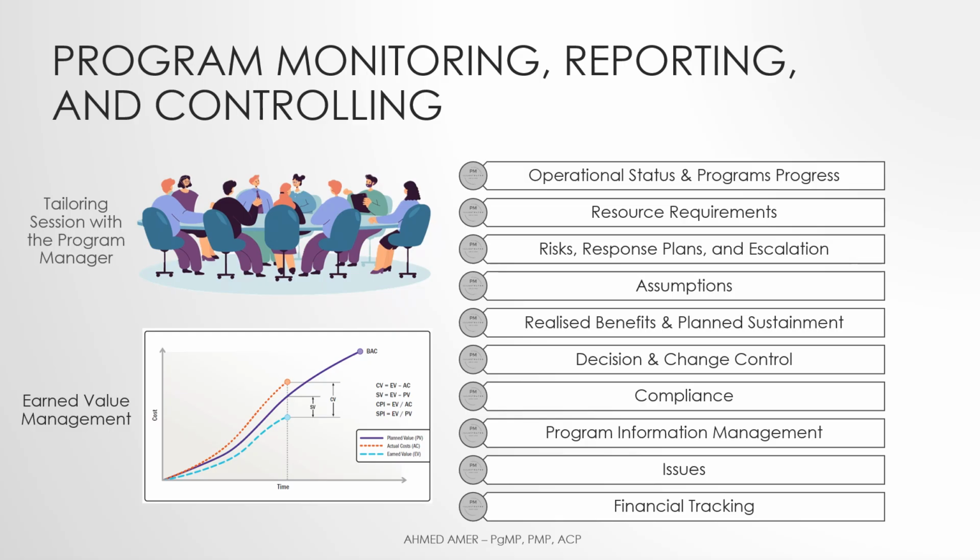As we can observe, out of these 10 elements, 5 of them can be summarized in the word RIDAC, which stands for risks, issues, decisions, assumptions and/or actions, and changes. These tend to stand as the most critical components of any program performance reporting. I personally consider the word RIDAC as the evolution of the abbreviation RAID, which some of you might be familiar with. RAID stands for risks, assumptions and/or actions, issues, and decisions.